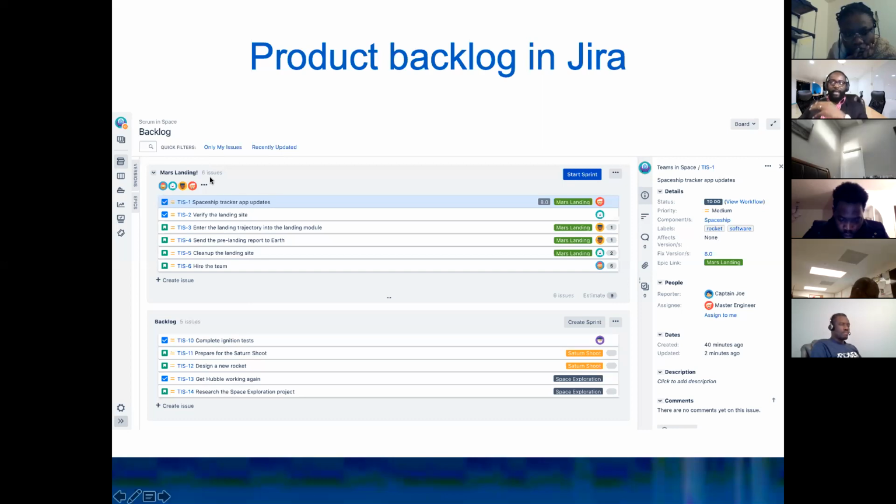Once you create a sprint backlog, you're going to be dragging all those items from the product backlog, I'm sorry, to the sprint backlog. Every time you do it, you have a few things left over in the product backlog, and like I said before, things can get added to it. Let's say initially you have 20. The first time you worked on 6, so you have 14 left. This sprint number 2, you're working on 4, so you have 10 left. And in the meantime, the product owner can add new stuff.